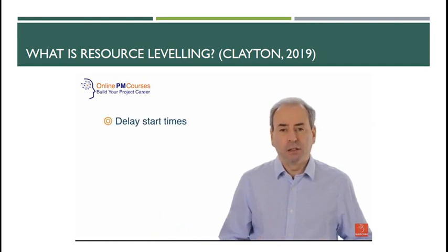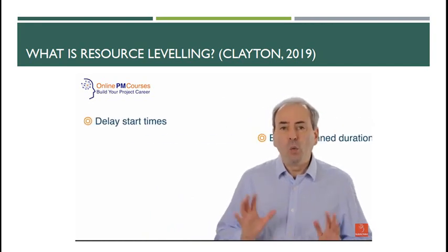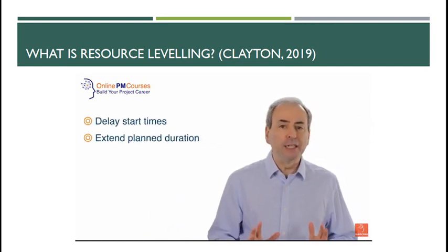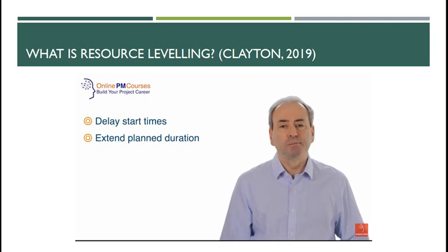The principles of resource levelling are about fair and efficient allocation of the work. And there are a number of ways that we can level our resources in a project. We can delay start times, or we can extend the planned duration of some of our tasks.